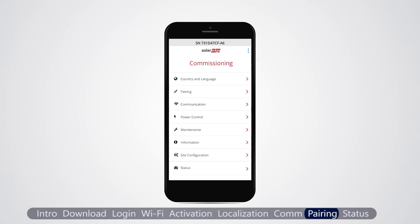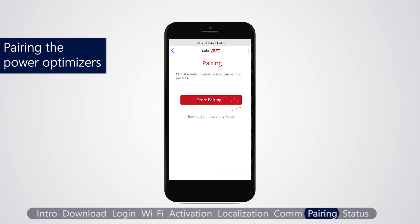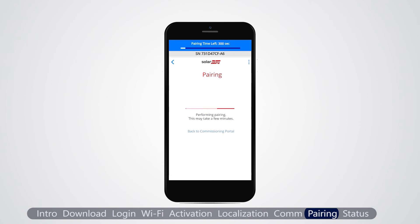Next, we pair the power optimizers to the inverter. The optimizers will not start producing power until they are paired. Pairing must be done when the modules are exposed to sunlight. From the main menu, select pairing and tap start pairing. When pairing complete is displayed, the system startup process begins.